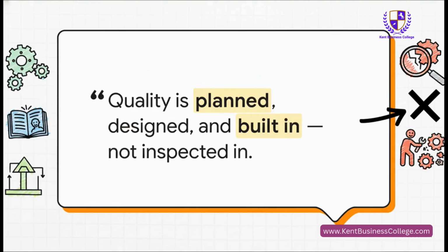Now this, Adam, this is a phrase you should probably tattoo on your brain. It's a core PMP philosophy. You have to focus on prevention over inspection. It is always cheaper and way more effective to prevent mistakes from happening in the first place through good processes, solid training, and proper design than it is to try and find them and fix them later on.